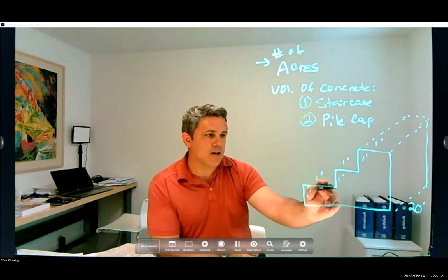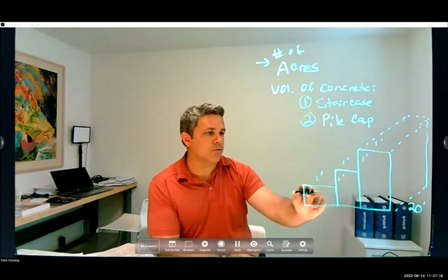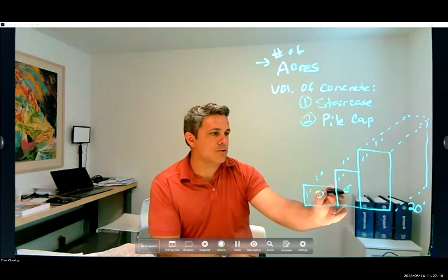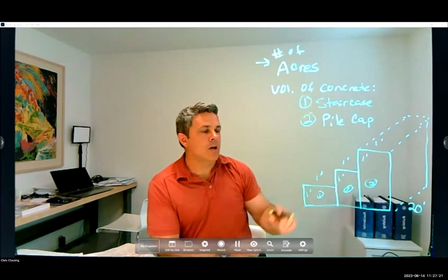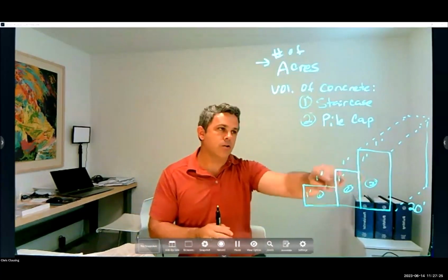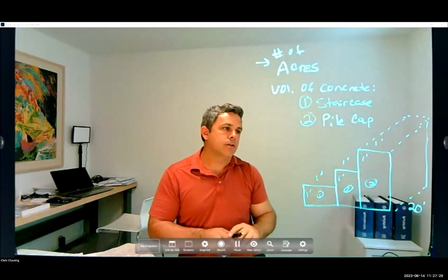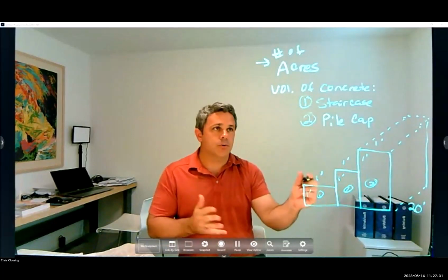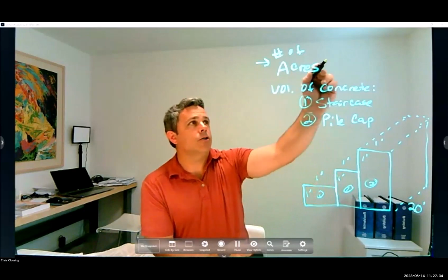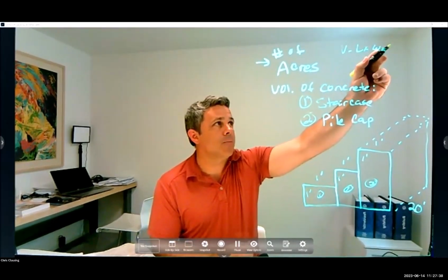So what we do is we just separate it into standard shapes. So we've got a square and 2 rectangles, section 1, 2, and 3 here. What I try to do is calculate the face area, like a 2-dimensional space, and then multiply that times the 3rd dimension, which is the width of my staircase, to find the volume. Because we know that volume is length times width times height, or depth, 3 dimensions.